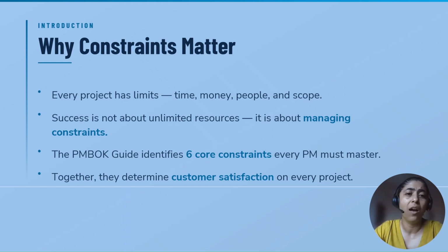Now imagine halfway through the development, the customer says, we also want biometric login, AI-based fraud detection, and multilingual support. Can we simply add these features without affecting anything else? Of course not. The project may require additional developers, the timelines may increase, cost will rise, and if nothing changes, the quality may suffer.